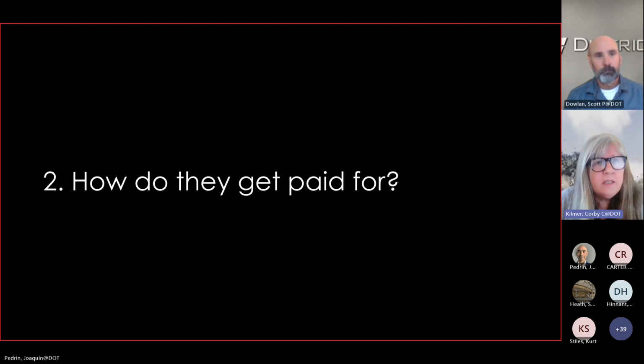Yep. So the PID says, hey, we're probably going to need a video or a 360 tour, or it says, nah, we're just going to need a couple fact sheets. And then we'll tweak our work plan resource request accordingly. To my knowledge, nobody has questioned our hours on this and sees it as a worthwhile expenditure. Scott, did you have anything to add?